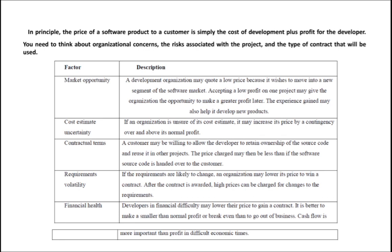The next factor that may affect software pricing is requirements volatility. If a company is sure that the requirements of a particular software are going to change, they can take the contract by bidding a very low price. The customer will give the project to that company because it is quoting a very low price. But if the company is sure the requirements are going to change, they will charge more when the customer asks for requirement changes.